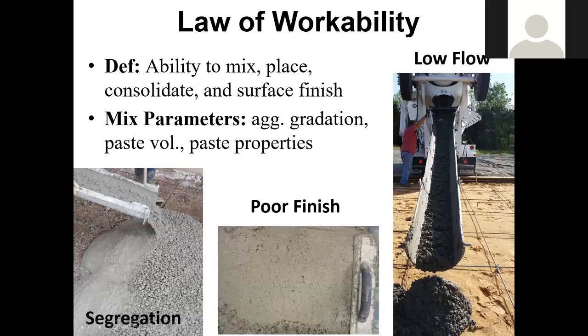So workability is the ability to place, consolidate, and finish the concrete. So you need to be able to have good concrete. You don't want concrete that segregates. That's actually a job I was finishing concrete on. You don't want that. When you order the concrete, this was a 6-inch slump that we ordered. It came out at a zero. It was very stiff.